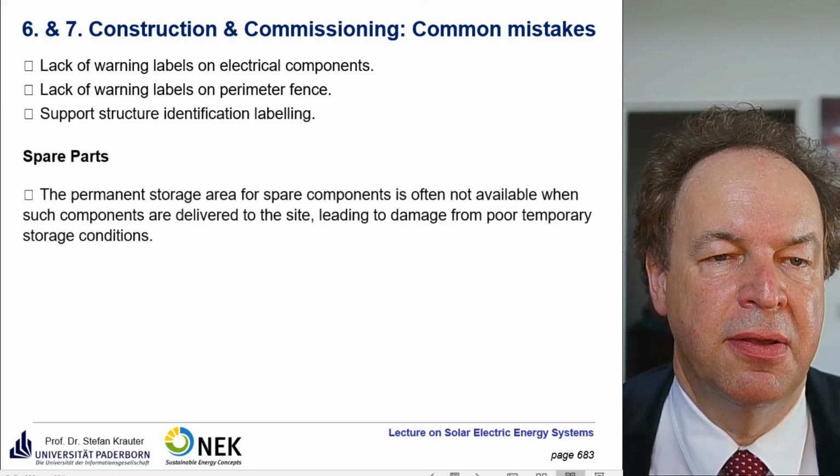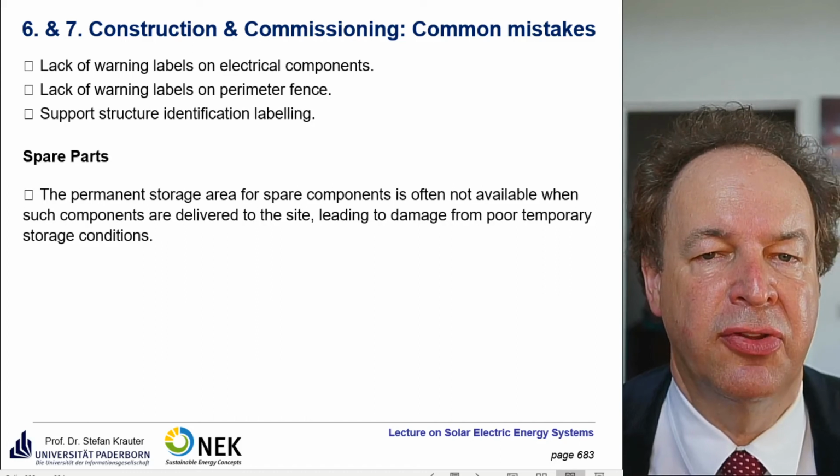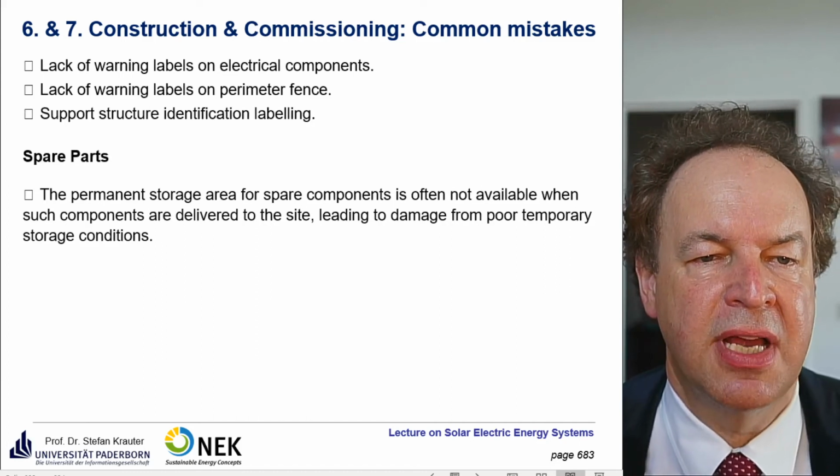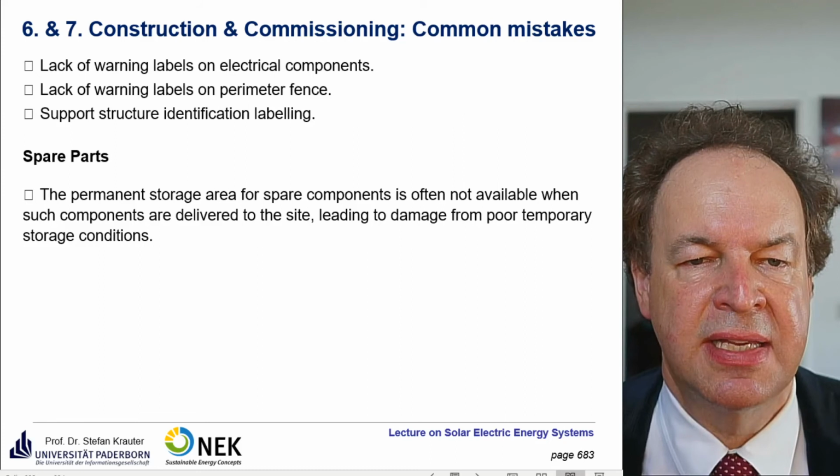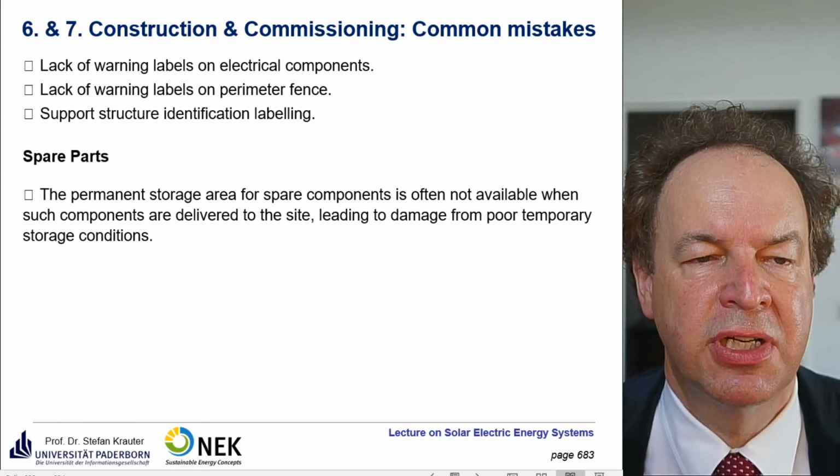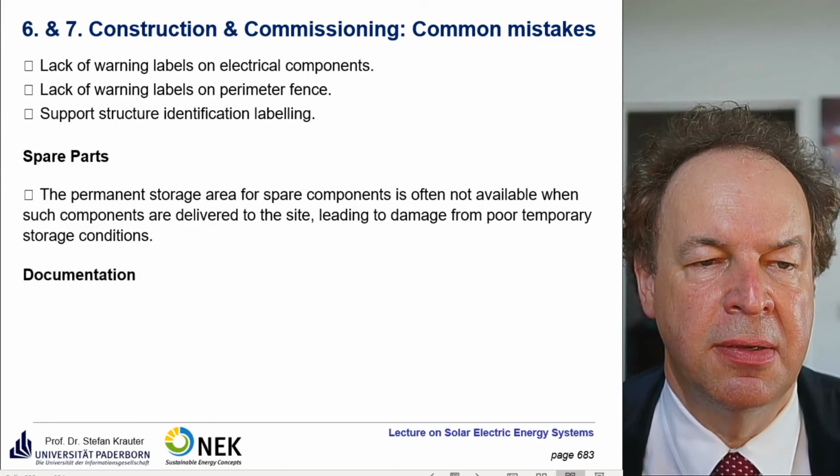Spare parts. The permanent storage of spare parts is often not available when such components are delivered to the sites, leading to damage from poor temporary storage conditions.